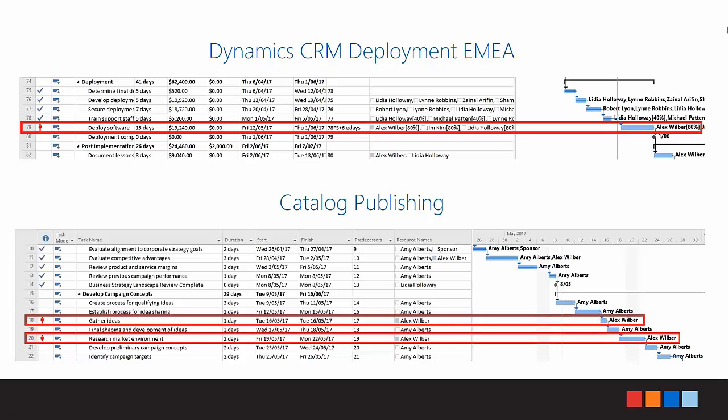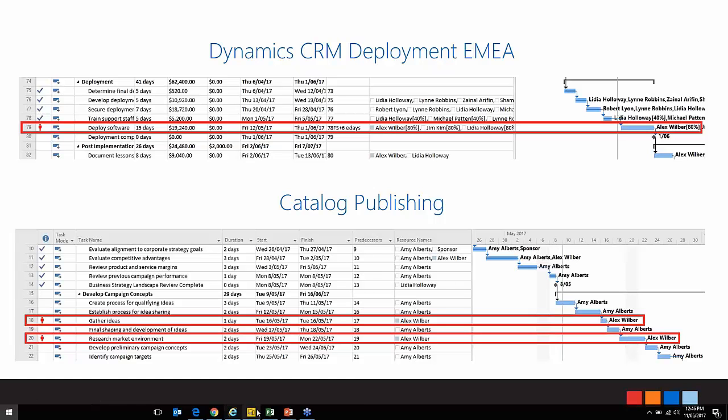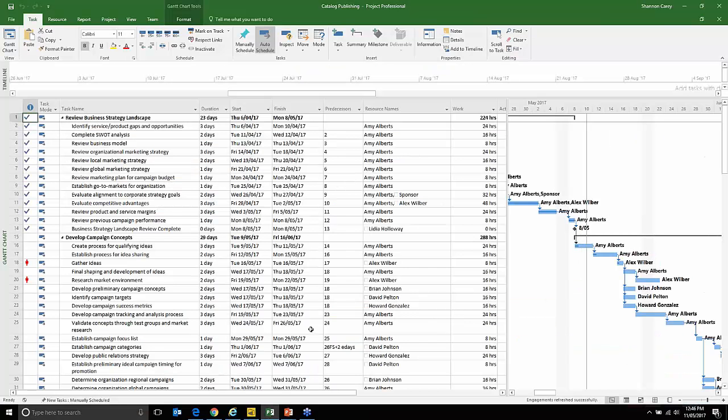project on the bottom. So if I pretend like I'm Lydia now, I'm going to go and open up Microsoft Project. And this is what you'll see in Microsoft Project, very similar to the screenshot. The first thing I want to point out is this first column that you see. It's got a number of different ticks in it. These ticks mean that that particular task has been completed. Now when you look further down, you see some little red men. And if I hover over the red man, it says this task has over-allocated resources.